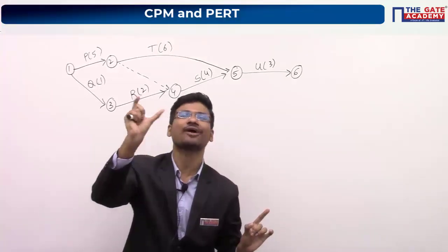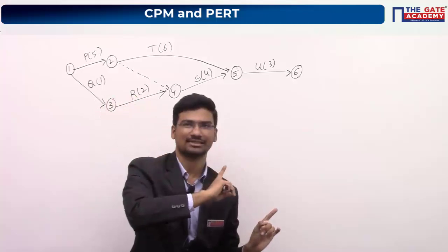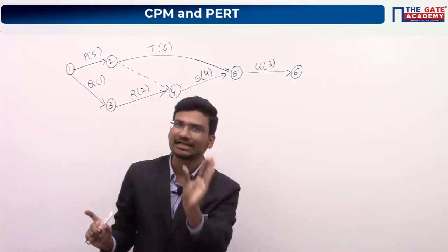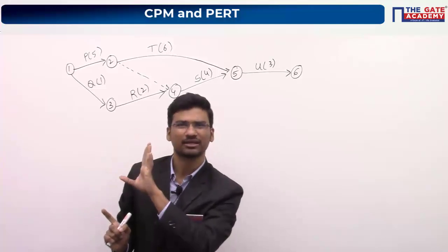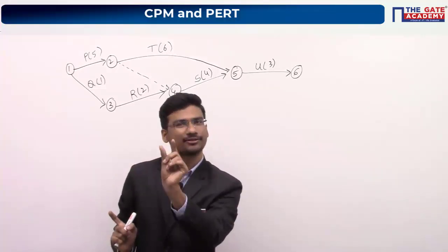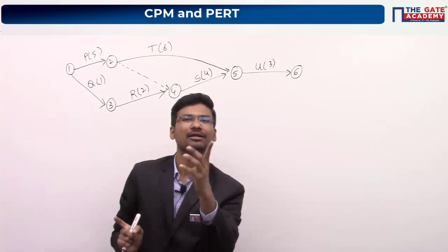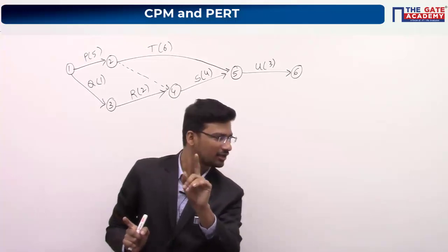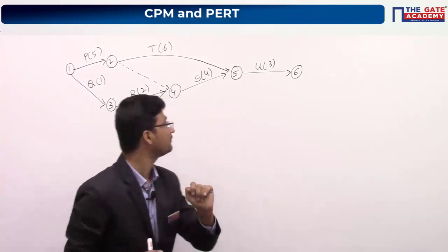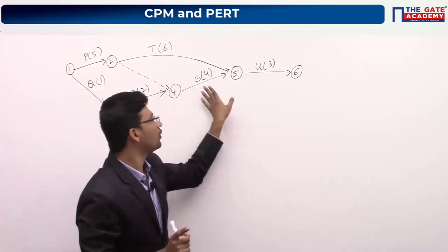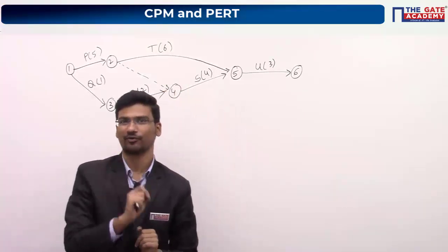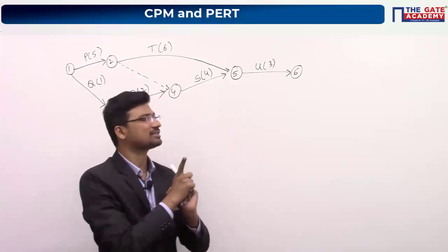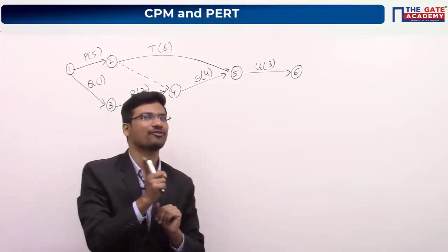You have to calculate the final time period of activity S. That means initial time period plus delay period, or float, is equal to the final time period. Add the total float value to the initial time period, which is 4 weeks for activity S. So 4 weeks plus the total float value will be your answer, not simply total float, because they are asking the final duration of activity S, not the delay period for activity S.